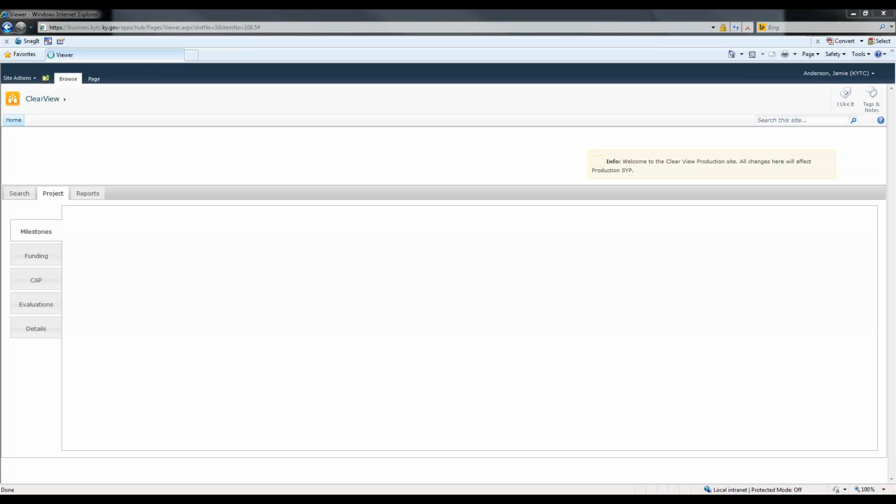Then you would put in the new cost estimate. You will key in the projected year of authorization, and you will put a remark such as updated estimate based on a joint inspection meeting. The system will automatically escalate the cost based on the projected authorization year.